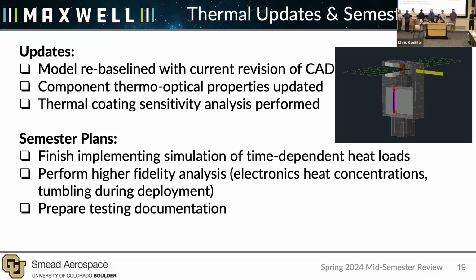So moving forward, we have tasks that need to be done. So first one is finishing simulation of time-dependent heat loads, which are based on power budget mode and duty cycle of components. And then after that, we have to perform the higher fidelity analysis of board concentration heats and the tumbling during the deployment. And then we have to prepare documentation for the tests like thermal vacuum testing and thermal balance testing.